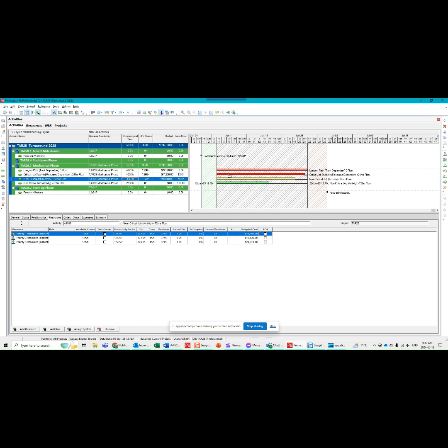But remember that the longest path isn't always the critical. And we don't really look at critical path in terms of there are multiple critical paths in turnaround environments. You'll see here that in my shutdown window, I would have a path. I could have it in my mechanical window, my startup window here in red. And I think it's important that people understand how this can be managed, and that as we look at what people refer to as critical path or critical work, we don't want to take our eye off of this